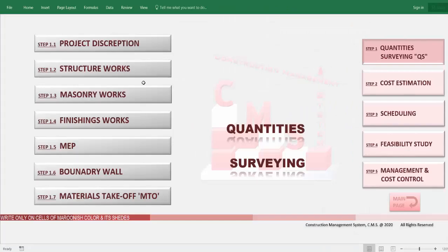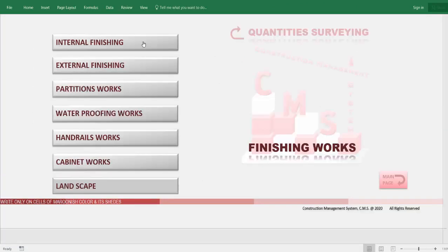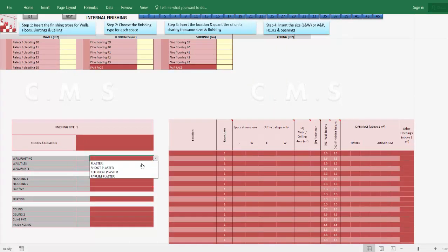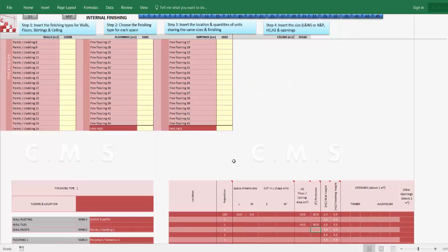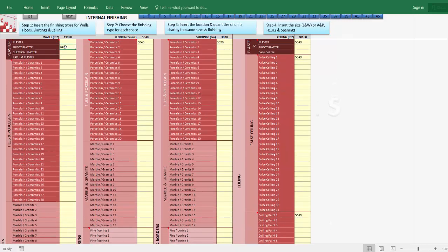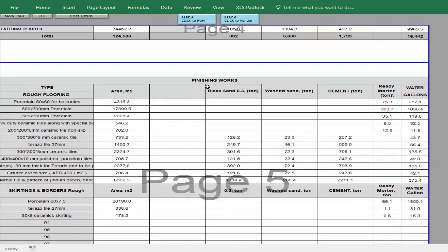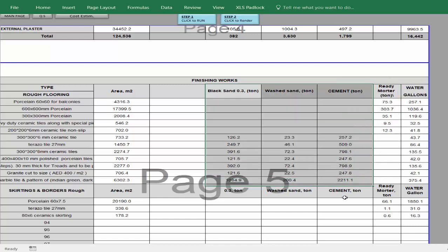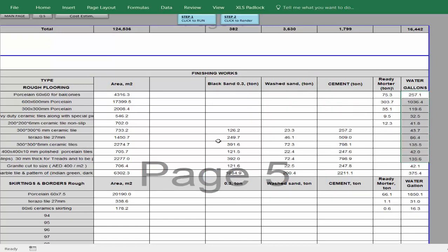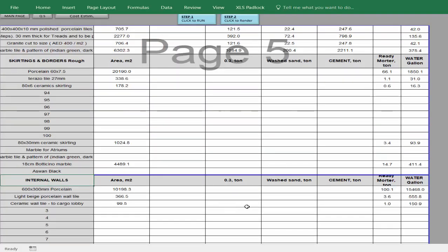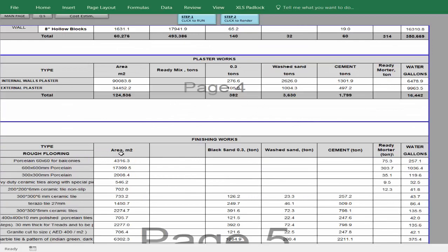Still in quantity surveying, the same can be done for finishing work. For any internal location, when you insert only the type of finishing from AutoCAD, CMS gives you the required quantities directly for plastering, flooring, skirting, and ceiling with all ceiling types. This information is reflected directly in the quantities takeoff — the amount of plaster, all types of finishing and flooring, skirting quantities, all required material whether ready material, ready mortar, or site-mixed mortar with sand and cement, even the water required for this work.